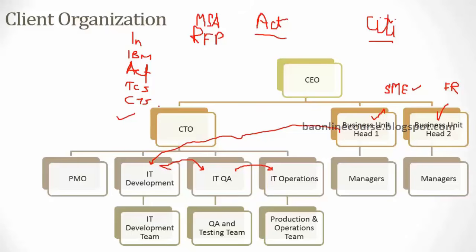So it will publish the high level requirements or features into this RFP document, and then say this is my scope, and these are my tentative timelines. Now you tell me how you are going to deliver. So all these 5 guys would respond to this RFP. So there is an RFP response as well.